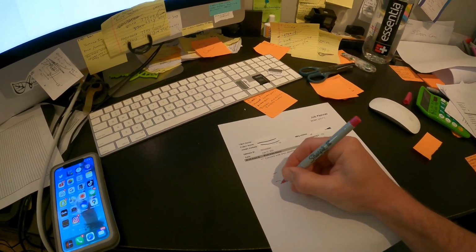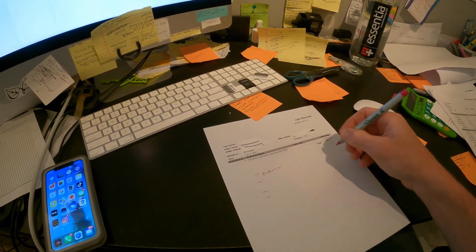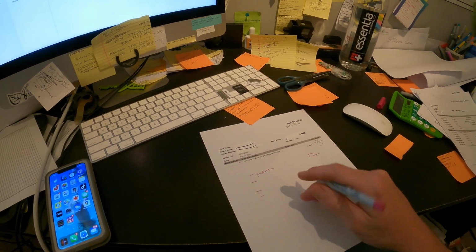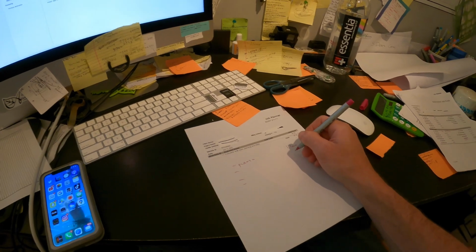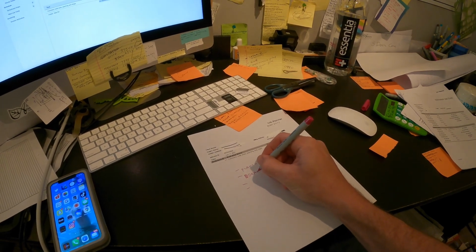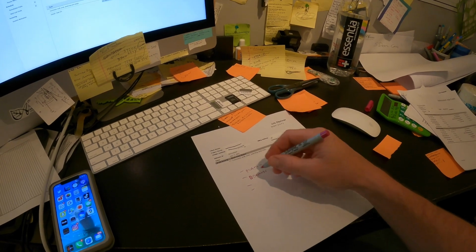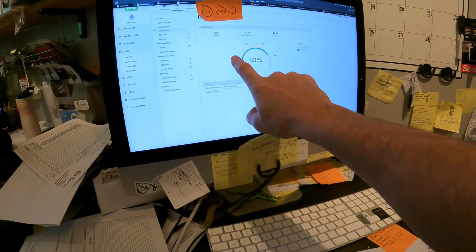But if you've got different phases of this job and you're anticipating, okay, planting, and this would be printed out, right? Planting was 17 man hours. You give that to your project manager and say, okay, planting guys, when you guys are planting, we're estimating 17 man hours, or, pretty much 2 guys all day. And then for, let's say demob, which is clean up and finish up and get machinery off site, we've got 4 man hours. And what they do is the guys would check into this on their LMN Time app.